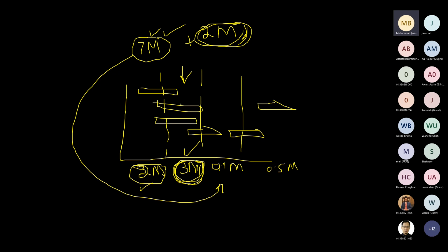We'll have to reschedule some of the activities to the next month, so that the requirement of funds should be within this limit of 2 million, right? So what would happen as a result? Our schedule would be delayed. The schedule will get longer. Is it clear?